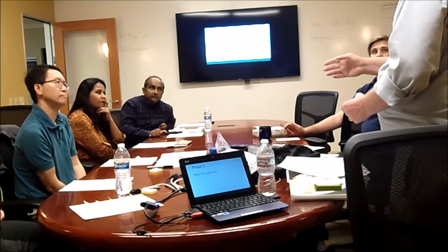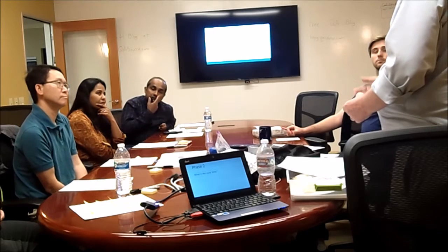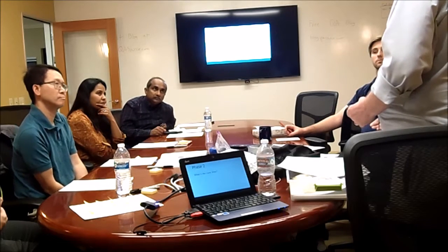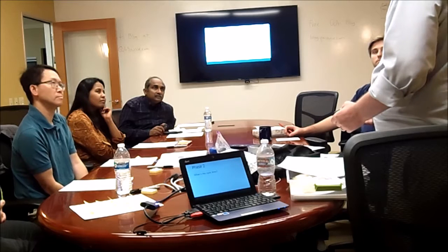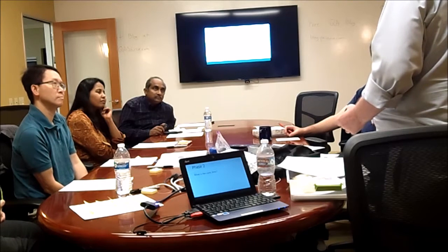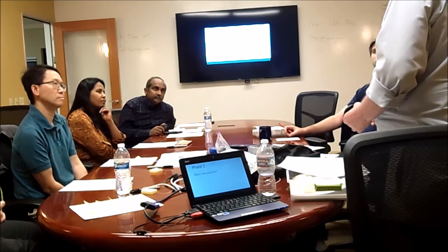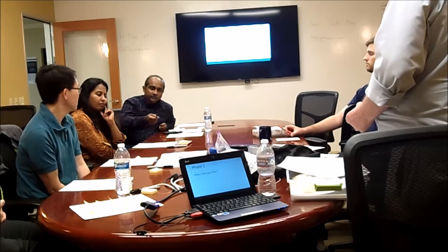that pile up, and they're not ever going to get done because of this imbalance, because people are working too fast. They're working ahead of the bottleneck, right? So that seems weird, that you could feed things into a queue that's emptying out and that some stuff would never get done. But that is the case. Just imagine that. And it leads to possible errors, because then he might pick up something out of sequence or something.